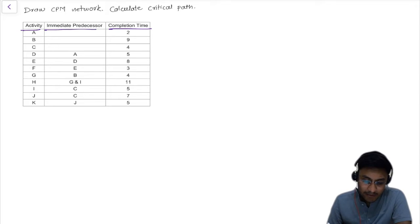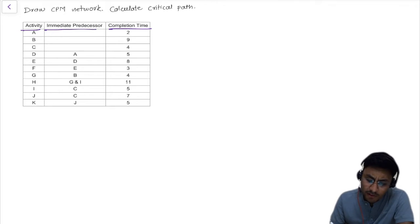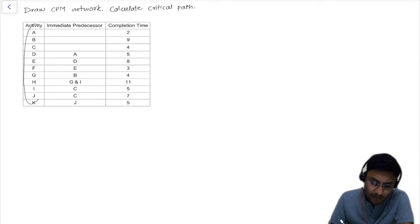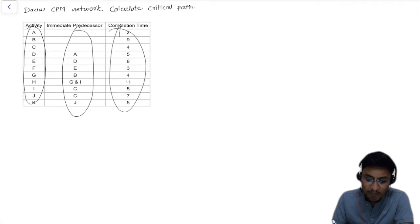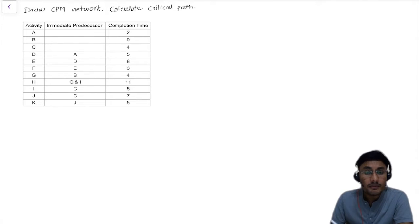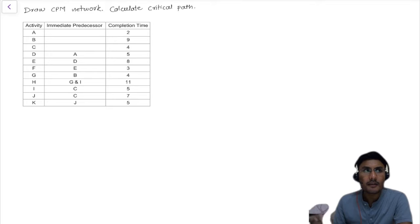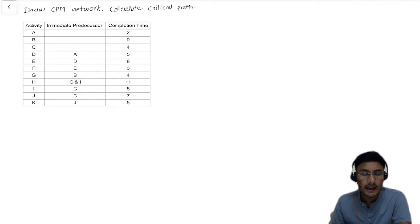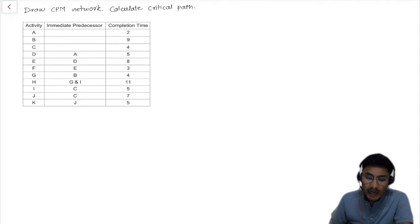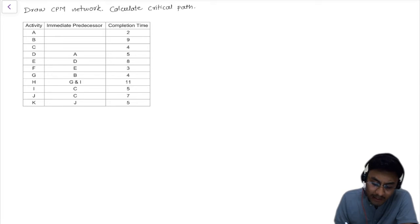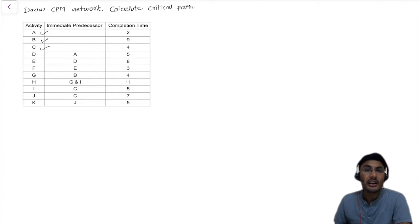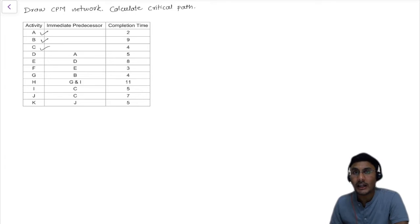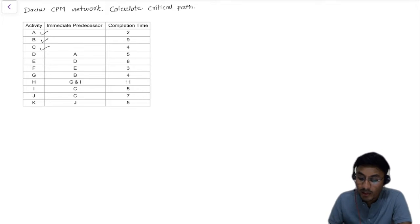First of all let's understand the activities. We have all our activities, their predecessors, and the completion time. When we do the diagrammatical representation of the network diagram we need to first look at the activity. Activity A, B, and C don't have any predecessor — it means they are the starting activities, so let's draw those.